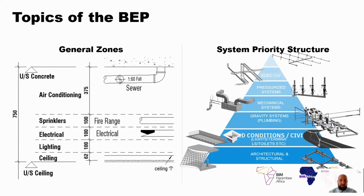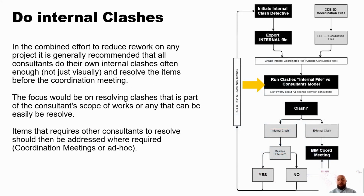Now, effectively, following this process already, you've reduced 60% of your questions by just analyzing these two items, where you can quickly make decisions on a draftsman level or the design level as to what needs to change. Now, when clashes do become more specific, we need to escalate that. I typically like to break my clashes up into 3 major areas. And this is when you start looking at what am I clashing into.